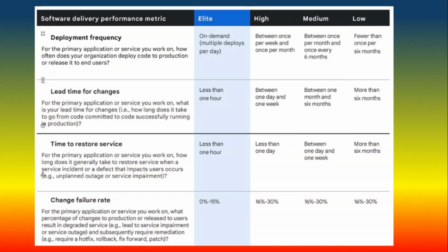And eventually, by making some changes, taking on small incremental changes, and working with the QMO team to make sure that they are able to test really quickly, we were able to increase the deployment frequency from maybe once every month or once every quarter to once in 2 weeks. And sometimes we would also do once a week. That was a big change for us because there was a lot of overhead in deploying to production, in terms of processes and testing, certification, things like that. But we were able to be in the high performance range for deployment frequency.